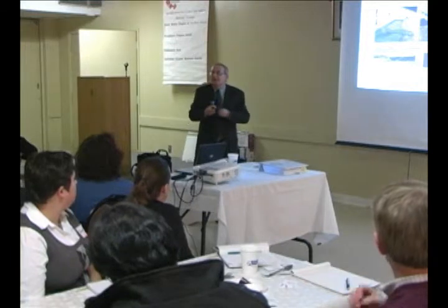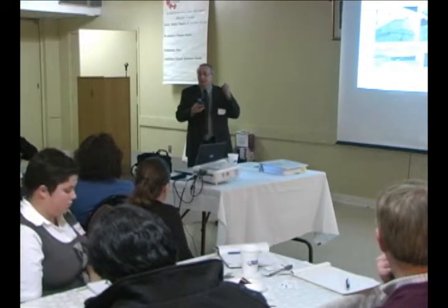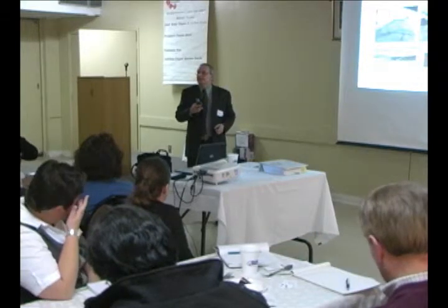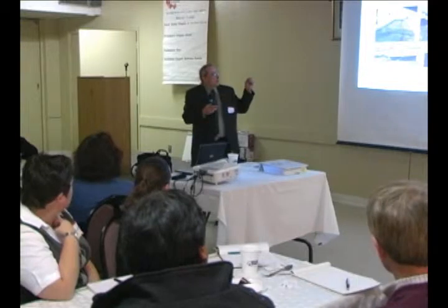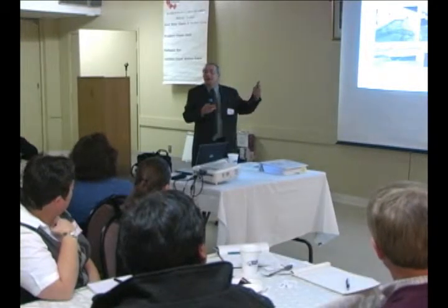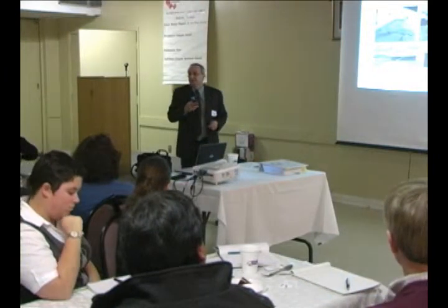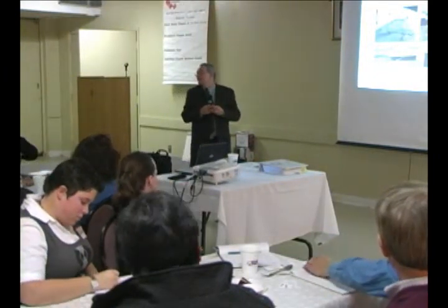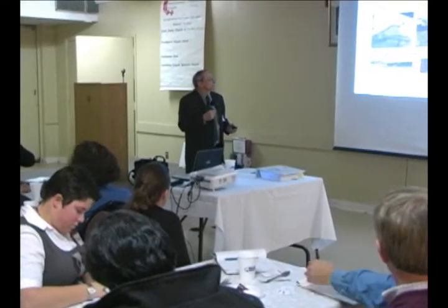Keep in mind that with LEED, you initially do the calculation of the points. You submit to the Canadian Green Council that this is what you intend to do. When you're all done, you have to demonstrate to the Canadian Green Council that you actually did what you said you were going to do. And that is the point for all these submittals. And it's a massive amount of documentation depending on the project.